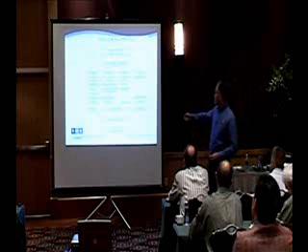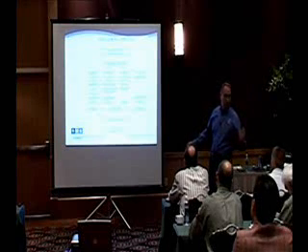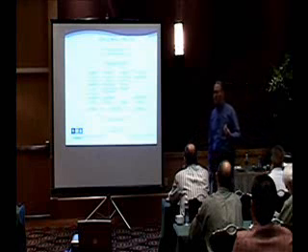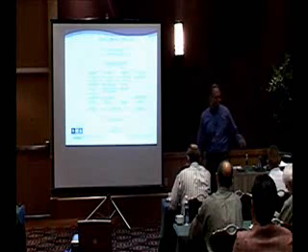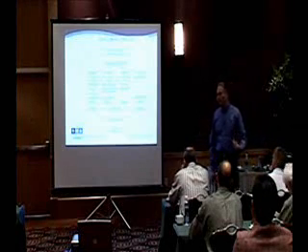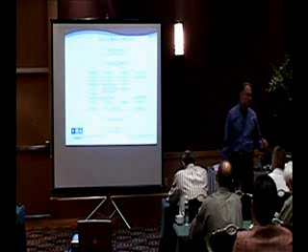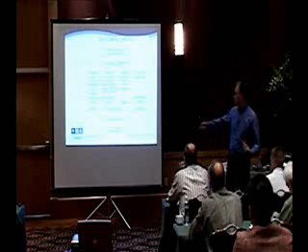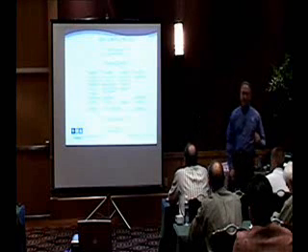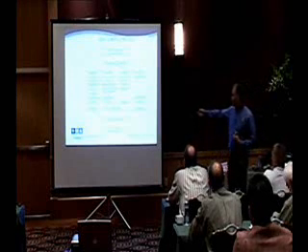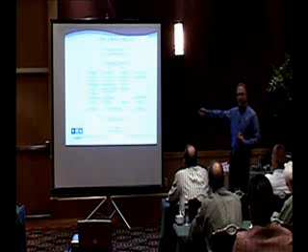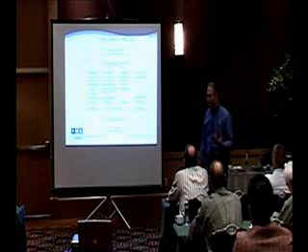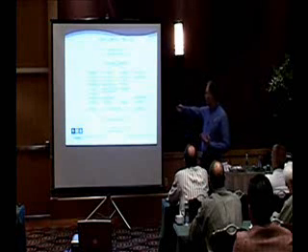From the subcontract agreements, then you have to have a system for drafting and designing the house, getting all the working drawings, everything that you need to submit to the bank and to the building permit people, but most importantly, to the trade contractors who are going to build and erect the house. That's the people who really need this information. Then we've got our estimate that has to come out of there. If the estimating department doesn't understand this part right here, can we accurately estimate exactly what's going to go into that home? Of course not. So everything starts up here with this.